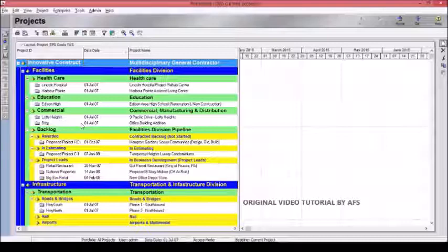What is an enterprise project structure? Let us try to understand that first. The enterprise project structure is a logical, meaningful arrangement of all the projects in your organization. You can think of it as a view of your company, and this view shows the lines of business of your company. It is laid out in a tree structure.